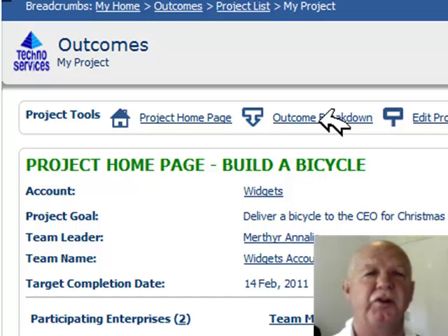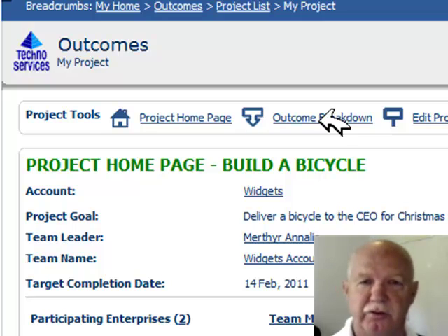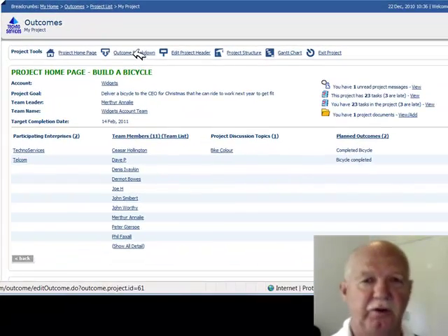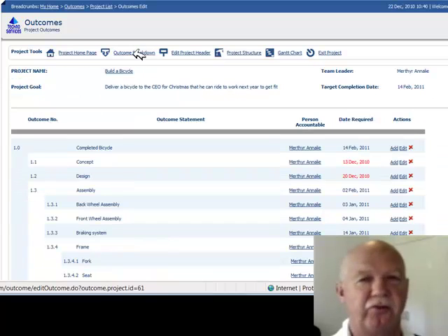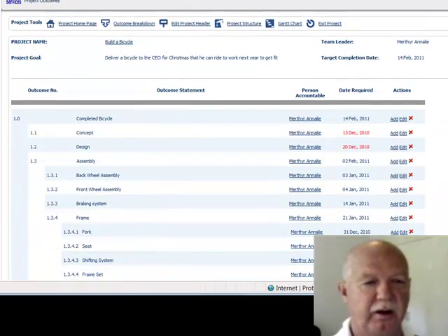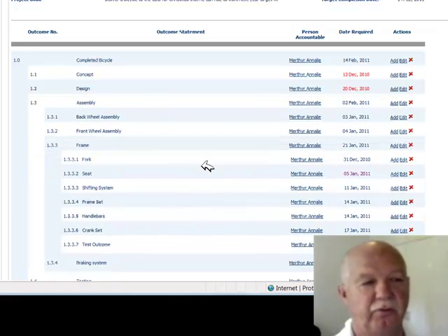When you first start creating a project, you'll define what all the key outcomes are that you're looking to achieve, and then break down into sub-outcomes and so on. Before you ever think about what are the tasks we need to do to perform these, we need to identify all the outcomes. This function here enables us to create those outcomes and structure the outcomes into a hierarchical structure, and it's got a drag and drop function that allows you to drag and drop outcomes throughout the different areas